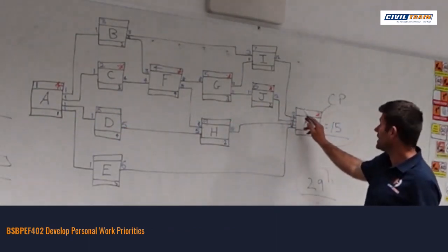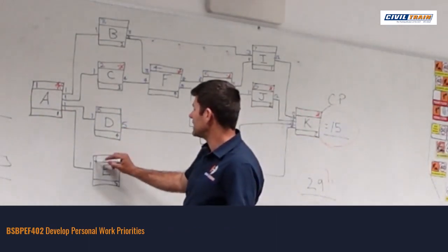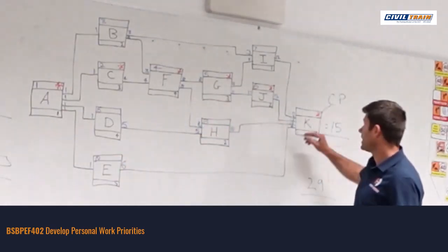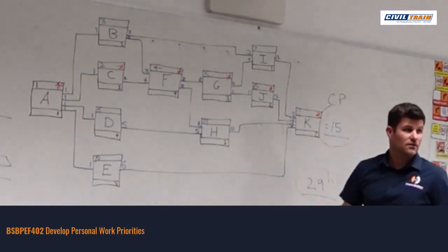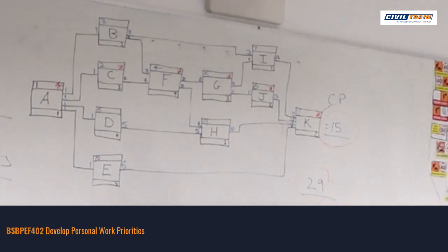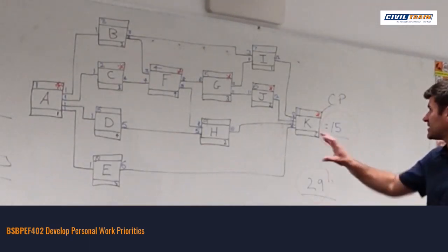I'll make that 10. I can't. Got one remaining. 10. Go back. And 11. So I've now put it in a cascading number sequence. So when I redraw that on a bar graph, it's going to have that nice cascading effect based on that critical path.